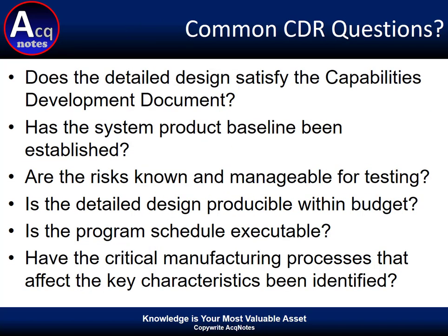I've compiled a number of common CDR questions that should be answered during the review. A few of these include question number 1. Does the detailed design satisfy the Capability Development Document? This is the number one question that has to be answered during a CDR. You don't want to get into fabrication with a system that can't meet requirements. That's just not good.